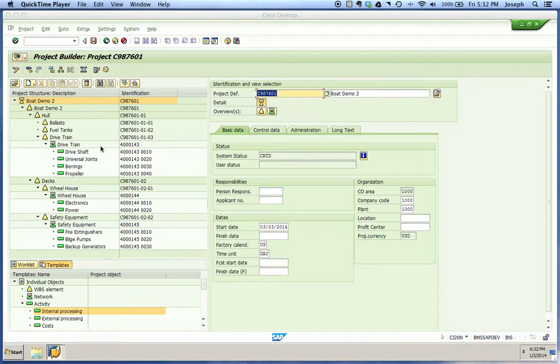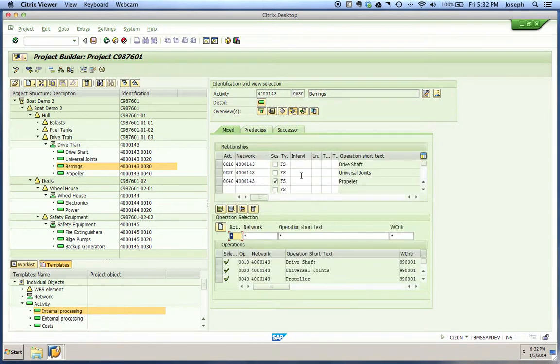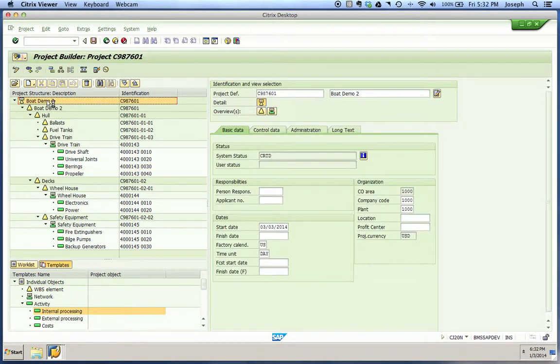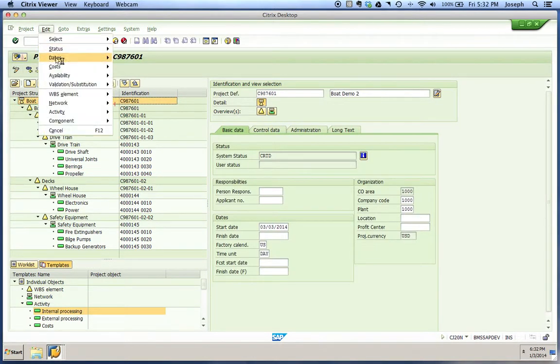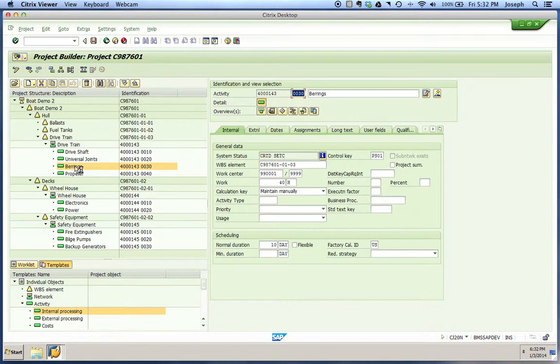demonstration. So if you did save on your last project, if you saved your lag time, you can go in and reverse that lag time simply by going to whatever activity you were on, choosing your activity overview, erasing the lag time that you posted on that activity, going to the top of your project, rescheduling, and saving afterwards, and then reopening. I did not save mine on this one, so we'll just work straight into it.